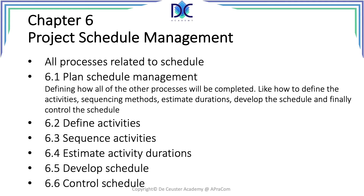We also have schedule management — how we deal with the schedule, what calculations we do, and what scheduling method we use. We identify activities from the work breakdown structure, find the work packages, sequence the activities, estimate how long they take, develop the schedule, and control the schedule. Basically we put everything together to create a project schedule, which is typically represented in a Gantt chart.